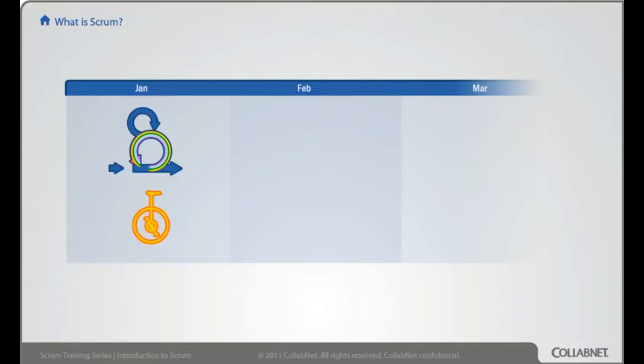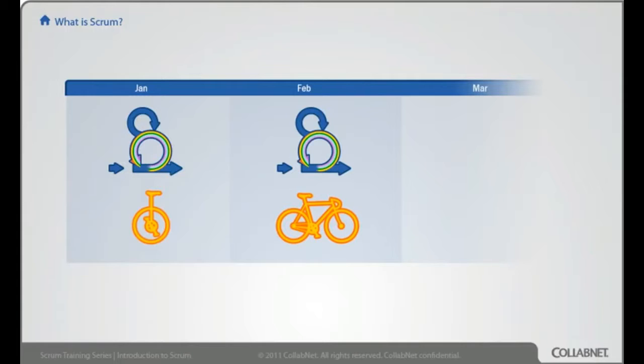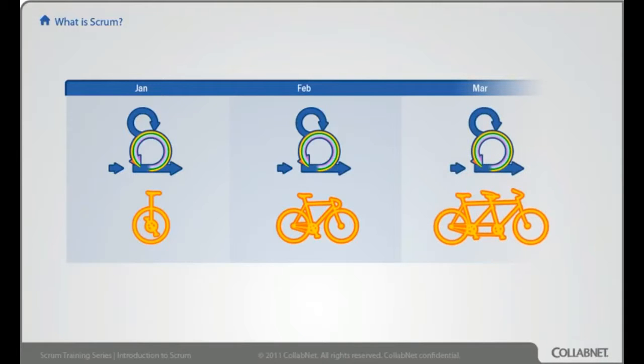Customers often need to see the wrong product before they can specify what they really need. With short iterations and more feedback, we have a better chance of discovering the right product. While the product owner doesn't actually have to ship every sprint, it's the team's job to make it possible. Sprints are officially 30 days long, and most Scrum teams are doing them in less, such as 2 weeks.